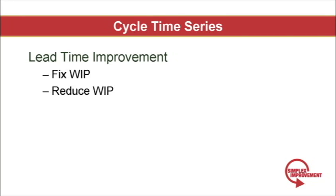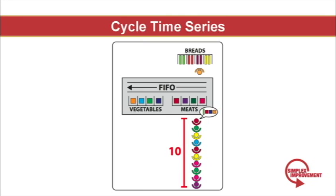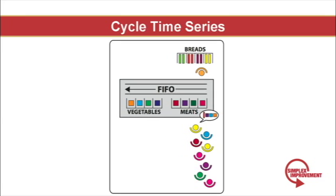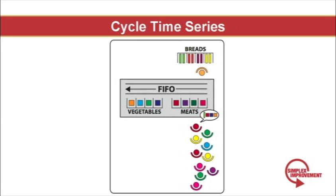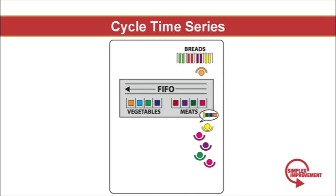So back to Little's Law and our question around the relationship between cycle time and lead time. In our example, the best way to decrease lead time is to fix, then reduce the number of people in line. If your line is constantly growing and shrinking, reducing cycle time may not have an impact on lead time.